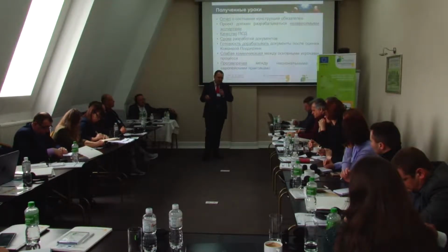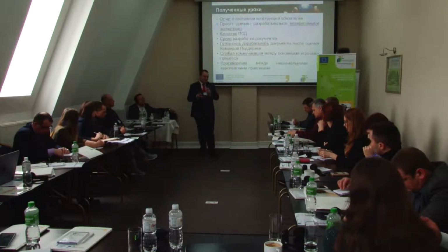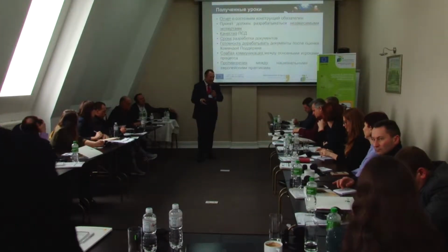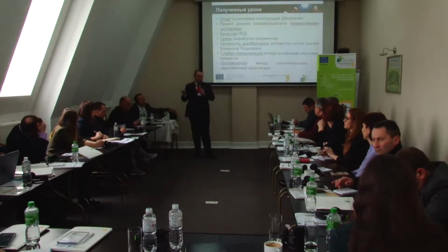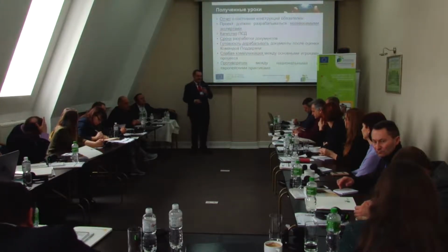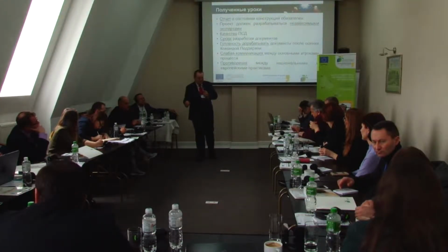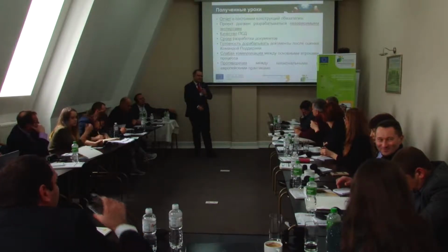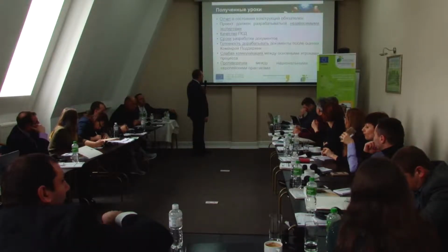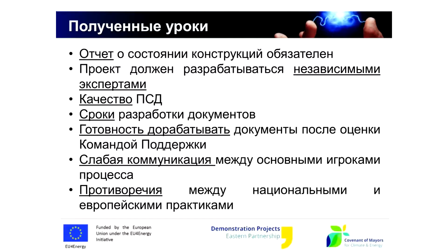The headmaster of the school said that the first part of the underground area of the school is a sort of anti-bombing shelter, and in order to change it, you have to work with some special safety organizations, security organizations, etc. So they did not cooperate with the administration of the building, with the headmaster of the school. And if they had done it, they could have solved this problem at the initial stage.